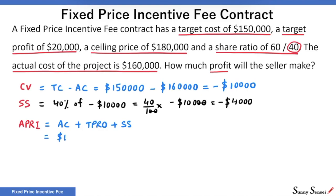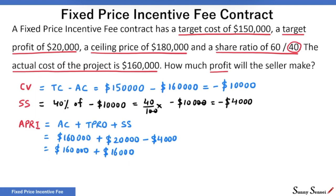Actual cost is $160,000. Target profit is $20,000, which is adjusted by minus $4,000 — profit has been reduced by $4,000. So actual price is $160,000 plus $16,000, or $176,000. We have to compare this with the selling price. $176,000 is less than $180,000, so we are definitely to the left of the PTA — the Point of Total Assumption from the introductory video on FPIF contracts. $176,000 is our actual price.